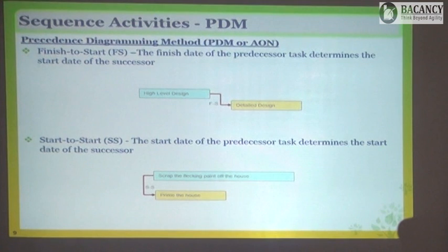Now the condition you have is, when you start your kickoff meeting, you must ensure that 2 months after that you are completing your deployment. Or 2 months is too long, let's say 10 days after that you are completing your deployment. Whenever you start, the meeting may take 1 day, but if you have sent the invite and you have the meeting, you will have to finish within 10 days.